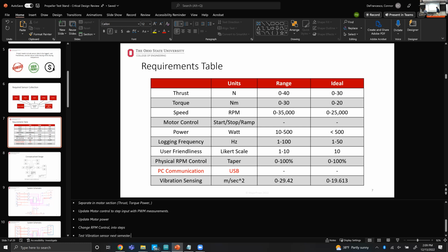Your schedule will be different, but I just need to see your progress, or if you came up with a challenge, right? You could create a board called challenges. You could create a board like I have for my work: could wait, to do, doing, done, right? Then I just move tasks, I create tasks. I have something like check your email every day, and then I create a to do, and then empty it. And then just move things, and the could wait is like a parking lot. Have ideas, things that don't have any major deadline that I would like to do. And it has improved my work a lot. I already had a to do system, but I'm seeing everything right in front of me.